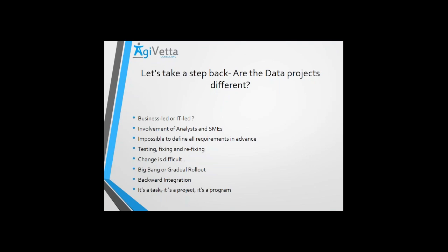The other problem it will lead to is that because there is continuous change in the design, the requirements and the expectations, testing becomes more crucial. Being a data warehouse project itself, there's a lot of data you are dealing with from different sources. That itself is complex. But then once you find that maybe your data sets don't match, or that they don't meet the requirements, you need to continuously keep on testing as you collect more data and build up your data warehouse. Then you need to fix certain issues which the users might have reported during testing. And then if any requirement changes, or any additional things are required, you again would need to refix and rerun those tests.